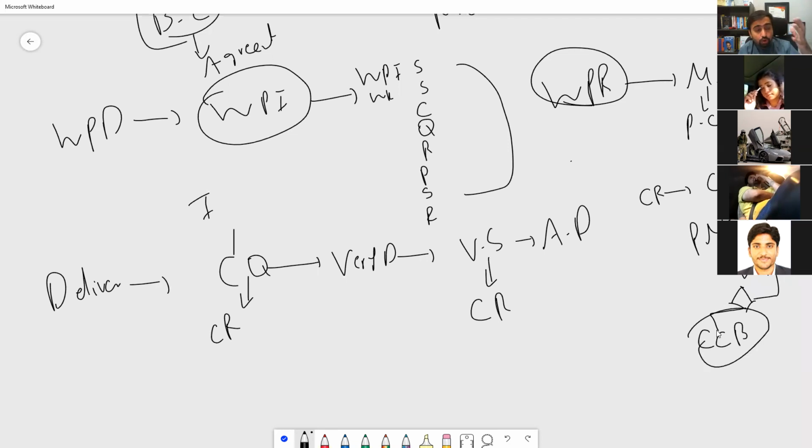The change control board is the project manager himself, the sponsor, and all the key people. They review the change, and they can approve it or reject it. If they reject the change, we give notice. If they approve the change, you update the documents, implement the change request, rebaseline the project, and notify everyone. If the customer requests the change, the project manager does not reject it.